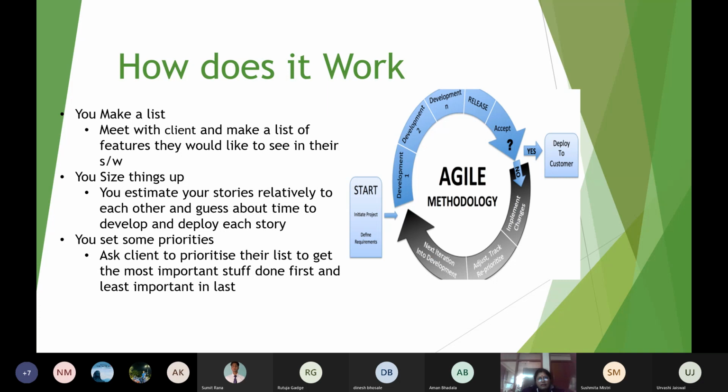Depending on this story, now the developer has to find out how this work can be broken into different items and displayed or given to the vice president. So what can be done? You can have authentication in a process. You can have fetching data from the database. You can put the report in the form of an Excel sheet, and then you can mail it to the vice president on his official mail ID. So these are the kinds of work which need to be done to fulfill that particular user story.